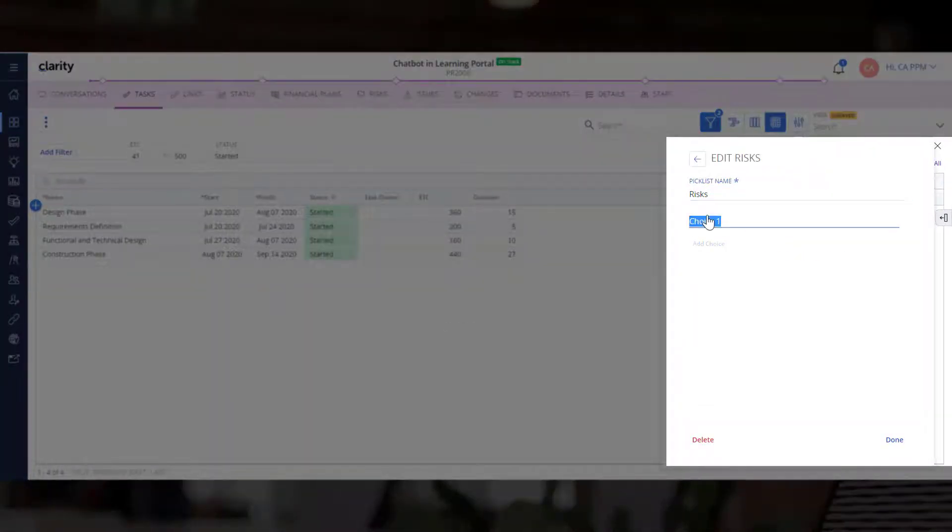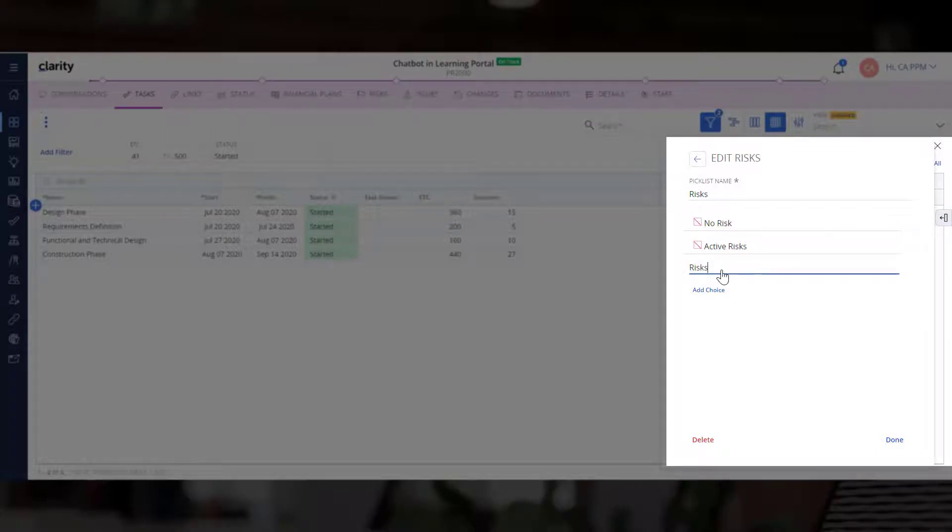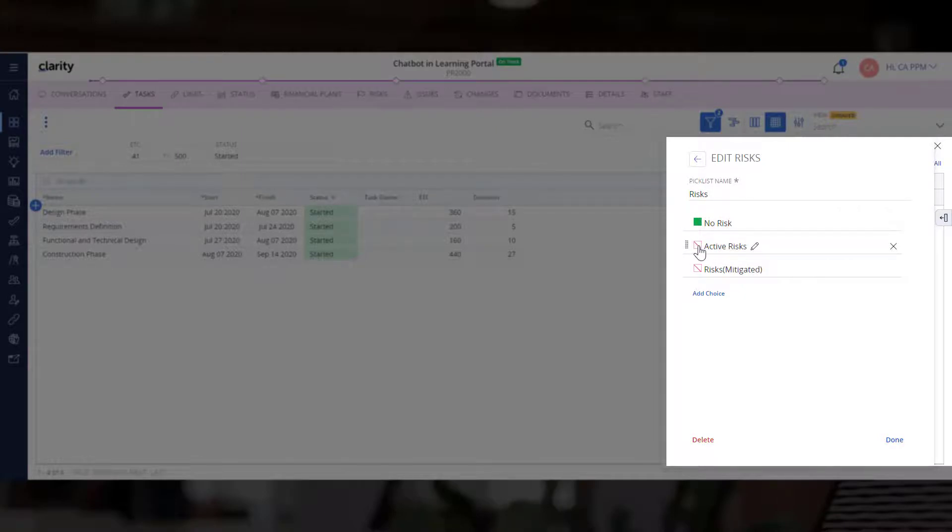Let's include three categories. The first category includes the tasks with no risks. The second category includes tasks with active risks. The third category will have tasks where the risks have been mitigated. Let's assign appropriate colors to each category.